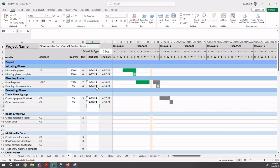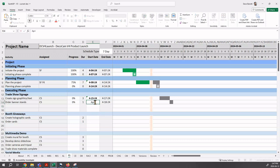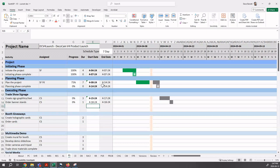And then we could do the same. This one will be one day after this activity and so on. Notice how when I enter a formula, the start date is bolded. That indicates that a formula, this formula indicates a dependency has been entered. Had I just entered, for example, had I just entered April 18th. Notice how it's not bolded. That indicates a date was entered there versus a formula or a dependency is entered there.